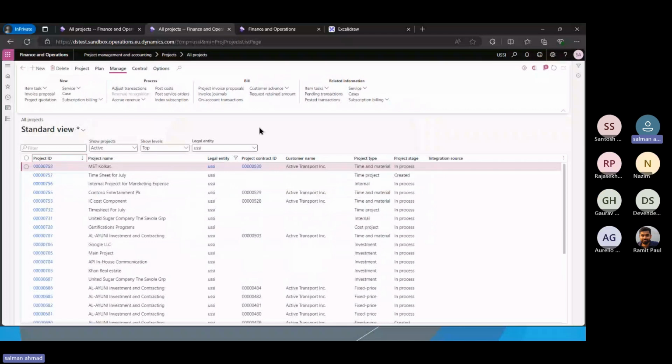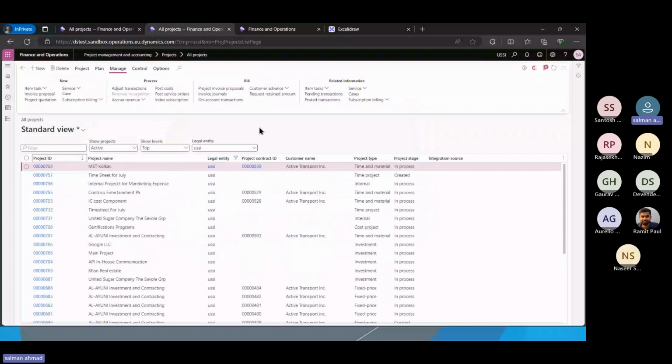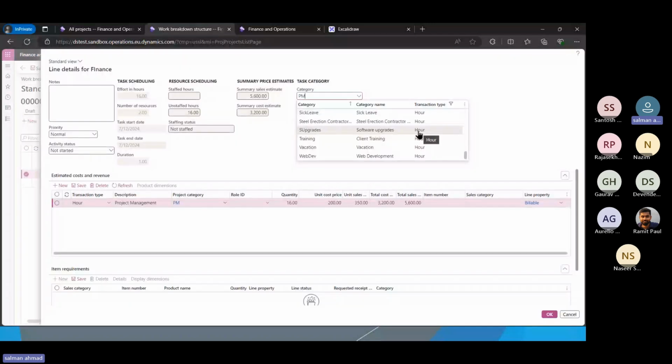Let's say I have selected this transaction type as an R transaction. So basically, I have got many categories that I can use and I can post the relevant Rs. No doubt, if we have budget control, the system will validate that on top of that category. But if there is no budget control, the system is not giving us any warning that this transaction will increase the budget amount with this cost.